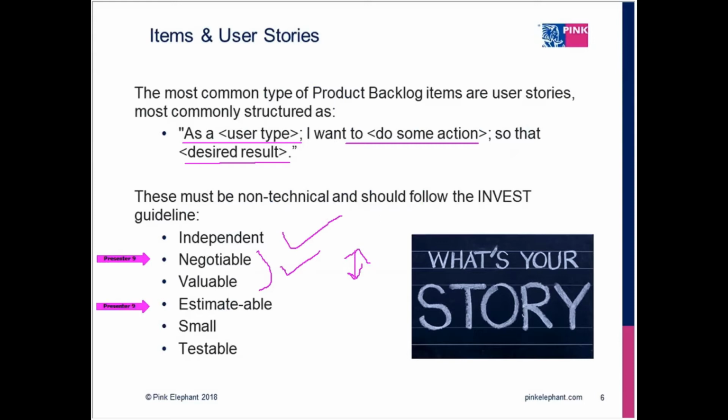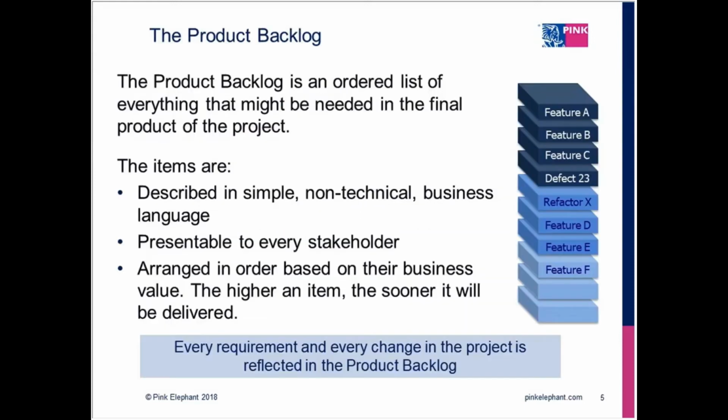And we also need an estimate of effort. So, you know, Agile doesn't mean we don't do any planning, or we simply say we'll be done when we're done. We have no idea when. Each of these stories is given a high-level effort type estimate. It could be story points, which is a comparative estimating technique, or it could be ideal time, which again is not a time commitment, but an ideal time guess.